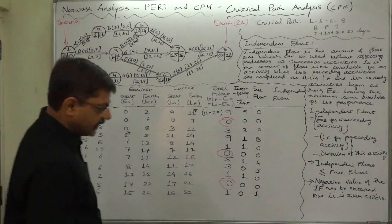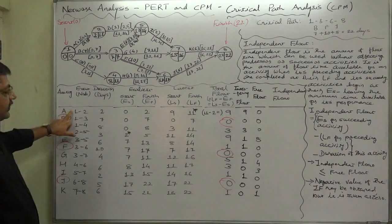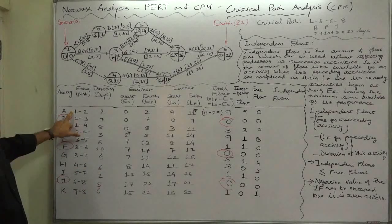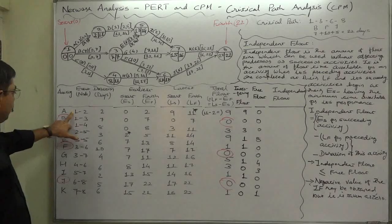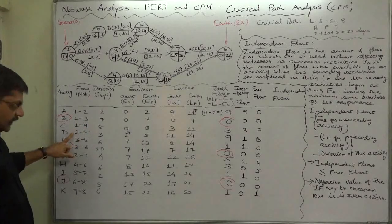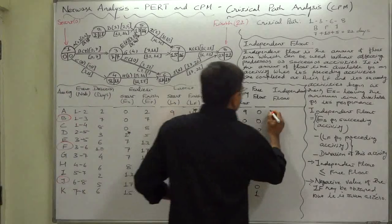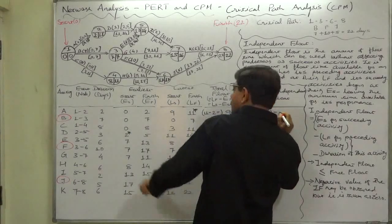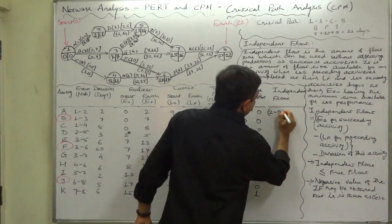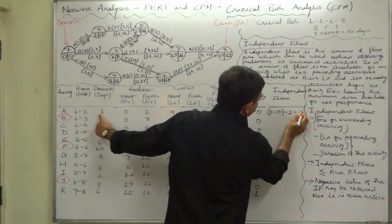Let's learn from our case. For activity A, there is no preceding activity, so the latest finish time for the preceding activity is taken as 0. It has a succeeding activity D, whose earliest start time is 2. So: 2 minus 0 minus duration of A (2) equals 0. Independent float of A is 0.